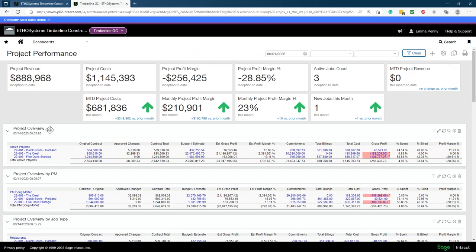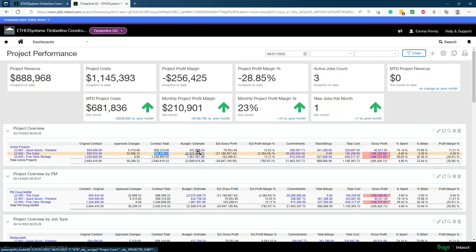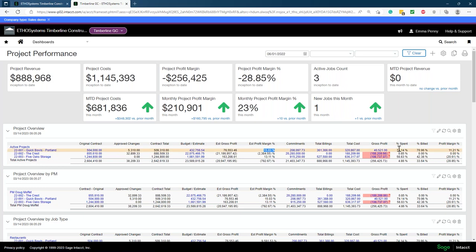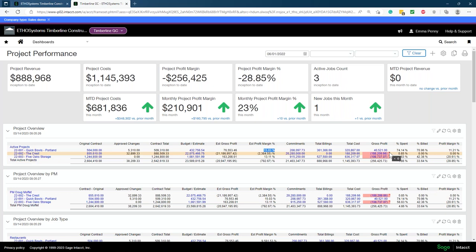I also like to point out our project overview report. It shows original contract, approved changes — change requests that haven't been approved won't hit this report yet — and then the new contract total, which is the most recent contract amount. You'll then see your budget and estimate, estimated gross profit, estimated profit margin, commitments, billings, costs, gross profit, and what's been spent versus what's been billed. If any projects aren't performing well, you get that big red bar to attract your eye right away.